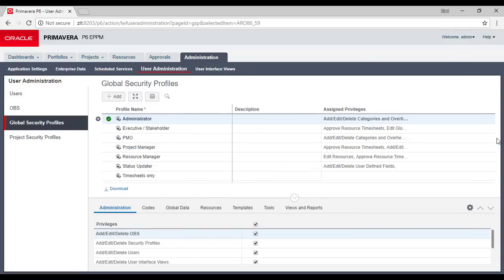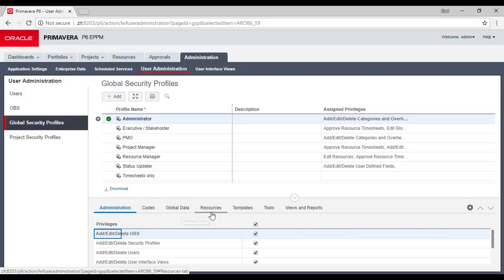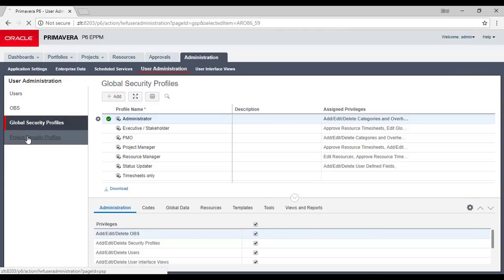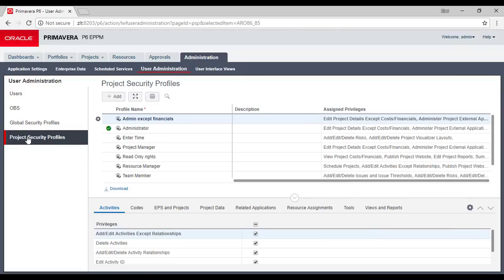You define tasks as we know it before — controlling privileges for codes, global data, resources, templates, tools, and reports, with some extra features. There are global security profiles and project security profiles, as well as resource security profiles. In the project security profile it's all about projects — you define who controls what inside the projects and give access to users according to their projects.